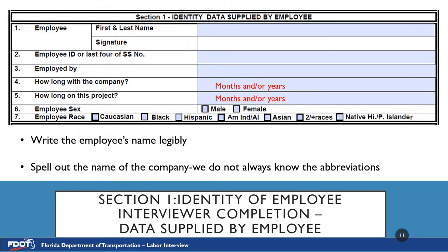Section 1 is Identity Data Supplied by Employee — basic background information of the employee. Remember, all labor interviews are confidential and must be conducted outside of earshot of anyone else on the project. Number 1 is Employee First Name, Last Name, and Signature. Please note this form is not to be given to the employee to fill out. The only thing the employee will complete is the signature after the interview is completed to confirm all answers.